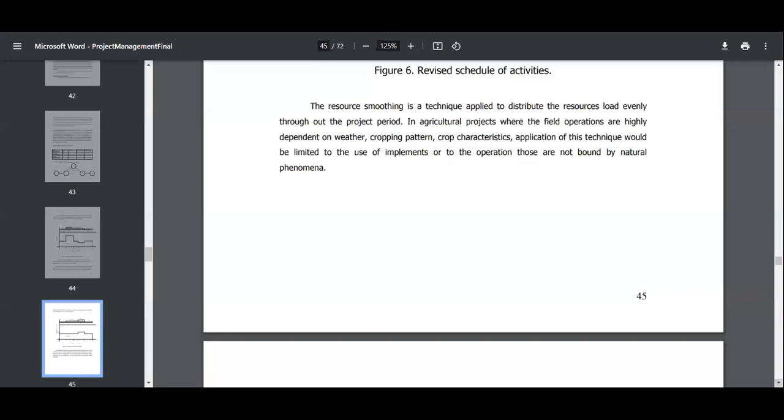So I just change my Tuesday or next day plan, and before starting Tuesday's activity, I give priority to Monday's pending activity. First, it's my priority to finish it and then start the next activity. But some people just keep it pending. If Monday's work is pending, they keep it pending and start Tuesday's. But some work depends on that, some work is related to that, right?